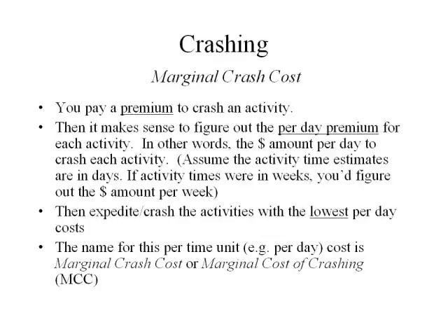To answer that question, we probably want to look at the cost of crashing the different activities. Usually if we crash an activity, we want to get it done quicker, we're going to have to pay a premium to make that happen. That might be overtime, that might be some bonus or some type of premium we're paying to a contractor. But generally, if you want to get it done sooner, it's going to cost you.